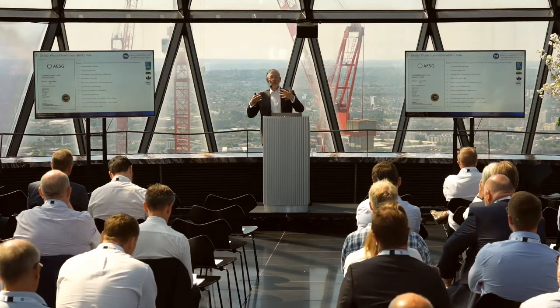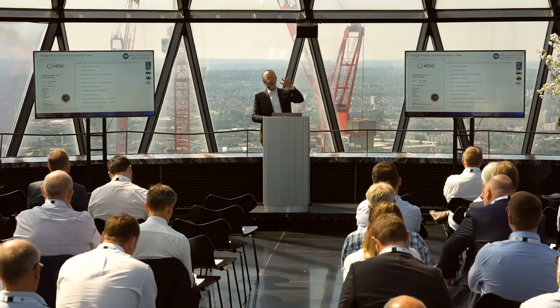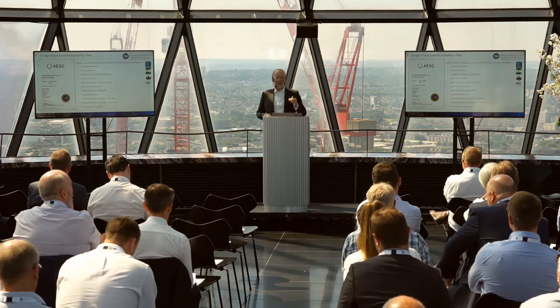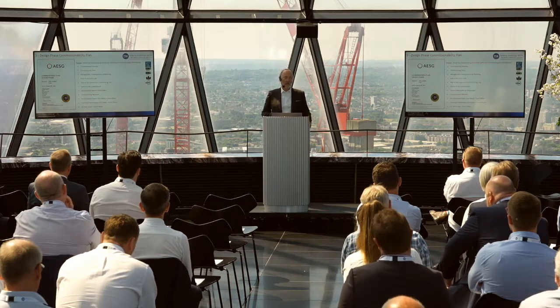Now, the design phase commissionability plan is really not actually a big document. It doesn't include all the functional performance test sheets because they have to be based on authorized sequences of operation, for example, right, which happens in the submittal process. But you can still map out the commissioning process. You can map out the scope of work. You can map out, is the CCTV included in this? Is building envelope included in this, right? So I think this is another high-value, low-cost item that if you put it in and then get it out in the tender documents, then there's no excuse for the contractor not to do it.